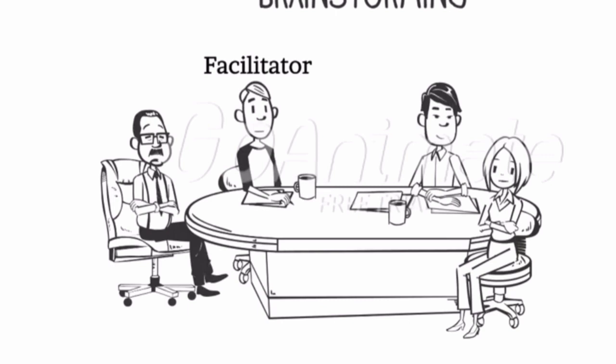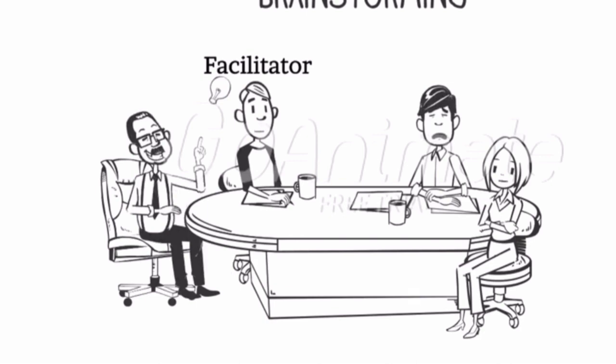An experienced facilitator should run the brainstorming session and introduce new categories of potential risks to keep the ideas flowing. After the ideas are collected, the facilitator can group and categorize the ideas to make them more manageable. However, group effects such as fear of social disapproval, the effects of authority hierarchy, and domination of the session by one or two very vocal people often inhibit idea generation for many participants.